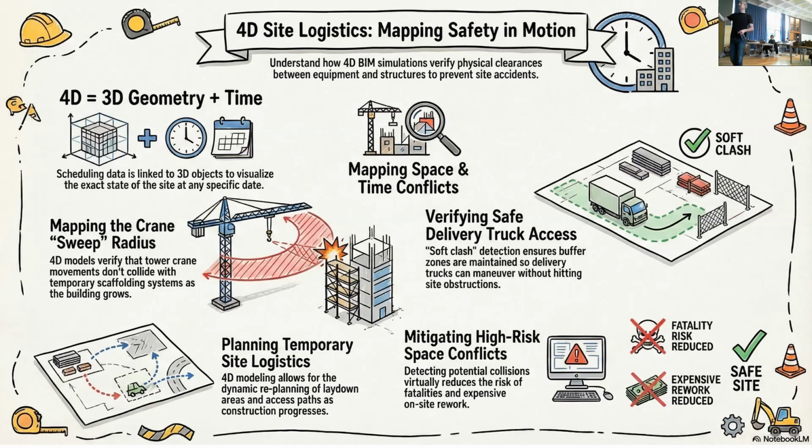So we have the same thing in construction too. In London, there are companies who do the procurement, or how do we call them? There's a particular name for those companies: just-in-time delivery companies. What they do is, for your project, let's say that day you are putting together the windows for the 4th floor. The 4th floor windows are packaged in that warehouse for that day.